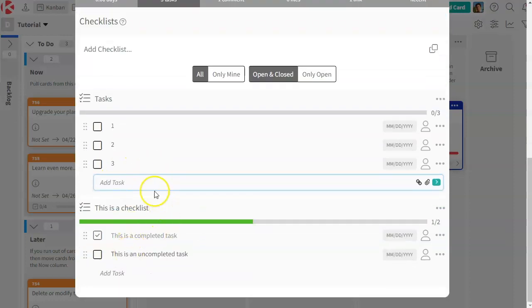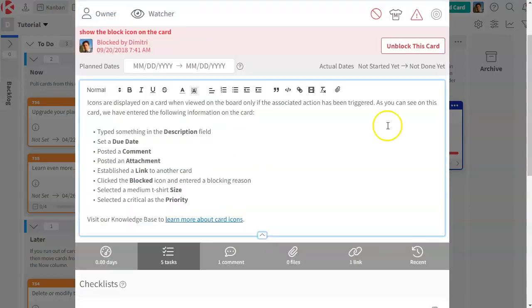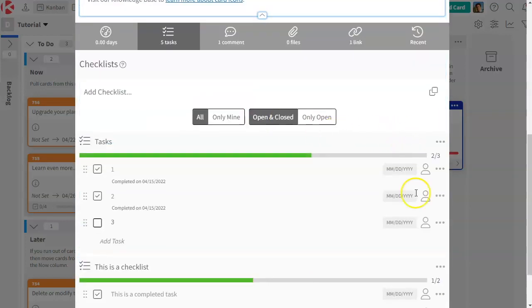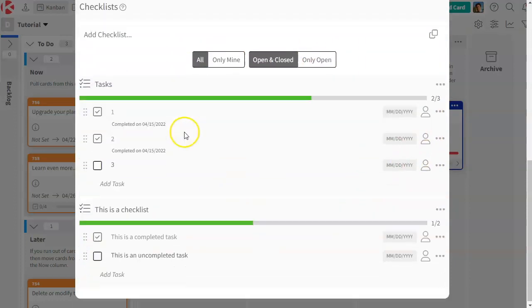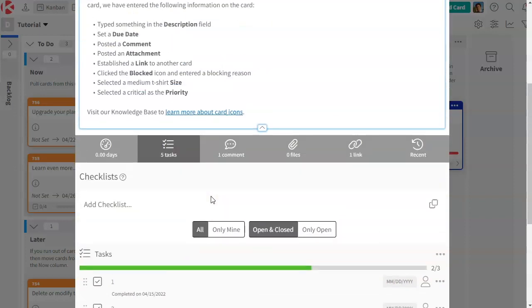You have multiple and you can check them off and set dates at the task level, which can be different than the dates at the card level. So that you can break down your work in more detail. So tasks are very powerful. It's like creating mini project plans at the card level.